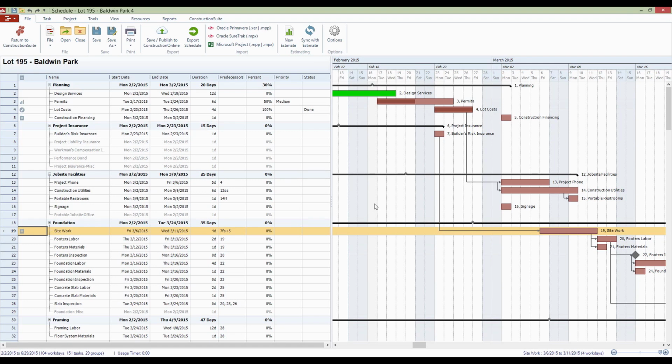So keep that in mind as you're setting these up. The primary is always the one that's going to be driving how you do business. And if you need to make some revisions, always make sure that you're making revisions to the primary and not working on a schedule that's actually just set off to the side and not important anymore. So keep that in mind as we're going.